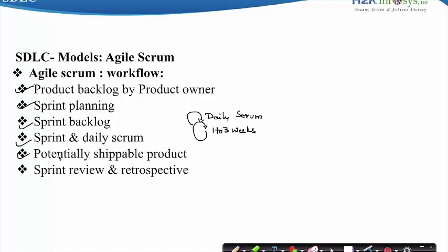The Product Owner can decide whether the product is ready to be shipped or whether any additional features could be added. At the end of the Sprint, in a Sprint Review, the team showcases their work to the Product Owner. In a Retrospective, the team works on what they can do to improve the process. This workflow is repeated for every Sprint.